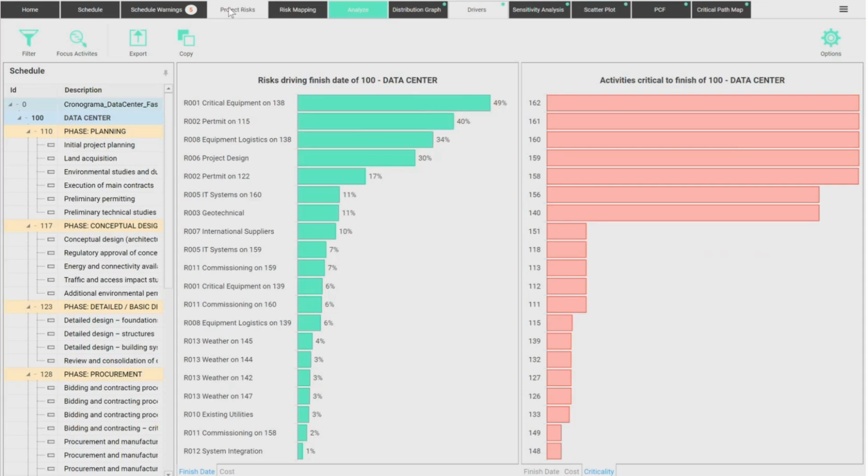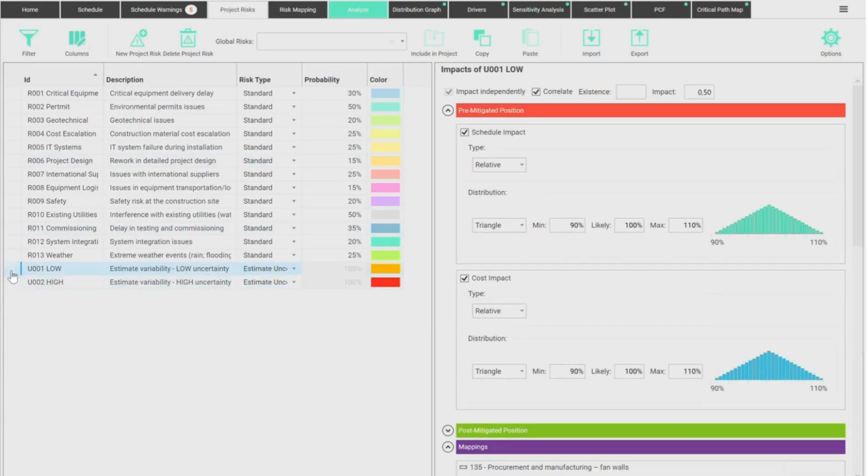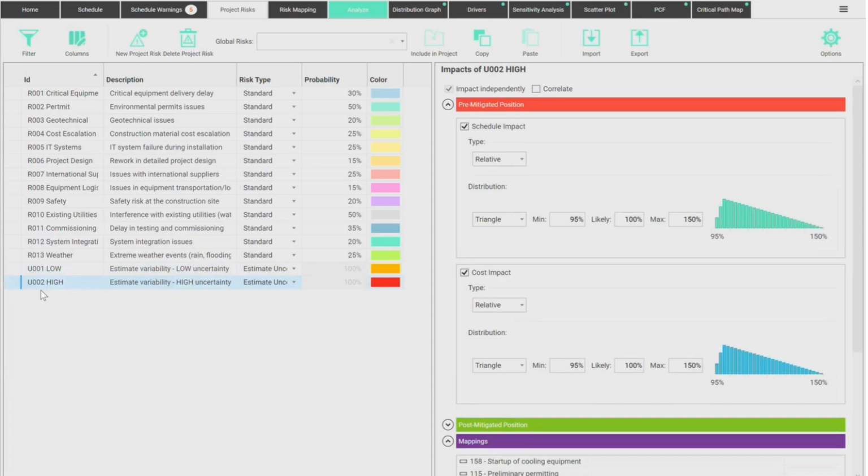But answering her question straight away, that's what we usually do with the variability. We assign one big variability to everything. One small variability to represent our lack of control on top of everything. And sometimes, most of the time, a second level of variability just for the specific things that we know may deviate more or that are more complex or with a less accurate estimate to begin with, okay?